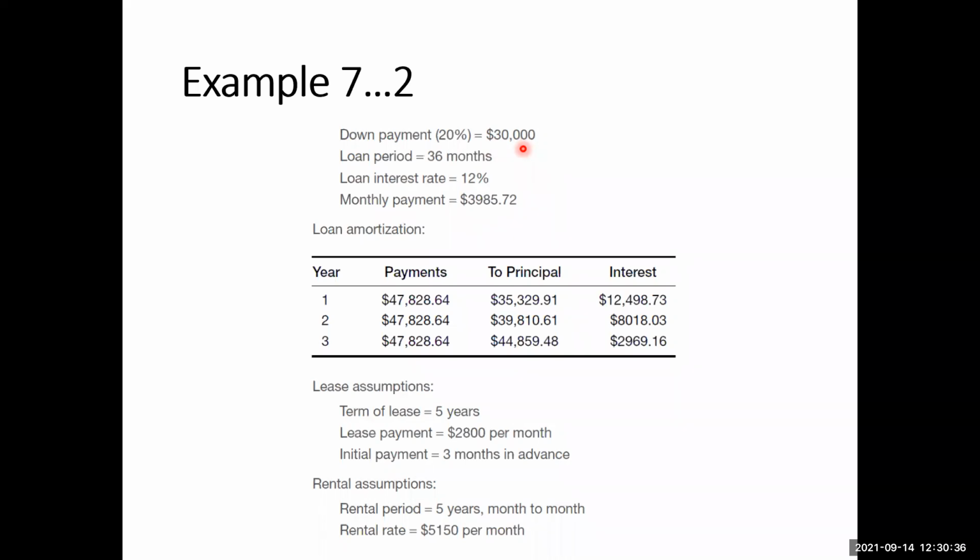That means if the contractor can pay back this $30,000, the bank will have the guarantee that the contractor is financially sound. At least he can pay $30,000, and then he will also be able to return the remaining $120,000 to them. Of course, the $30,000 is their own money, but it serves as a guarantee to the bank that the contractor is capable.